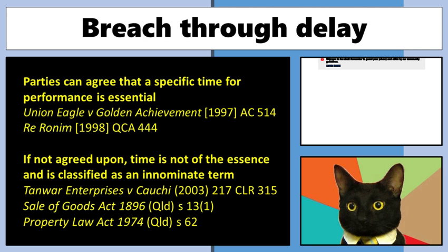Because by default, it's that second clause there, that if it's not agreed upon, it's an innominate term. Small breach, not going to matter. If you say time is of the essence, the courts will hold that strictly. And with things like settlements, if you have a very small delay and you rock up late, too bad.